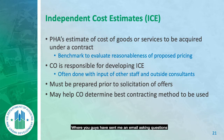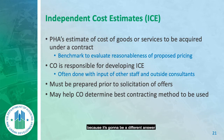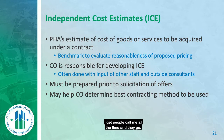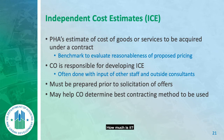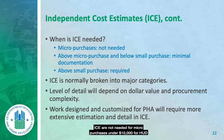Doing the ICE can help the contracting officer determine the best procurement method. When someone asks what the best competitive method is, the first question is: what is the value? If it's $500, the answer is none — don't do a competitive solicitation. ICEs are not needed for micro-purchases, which are under $10,000 for HUD.